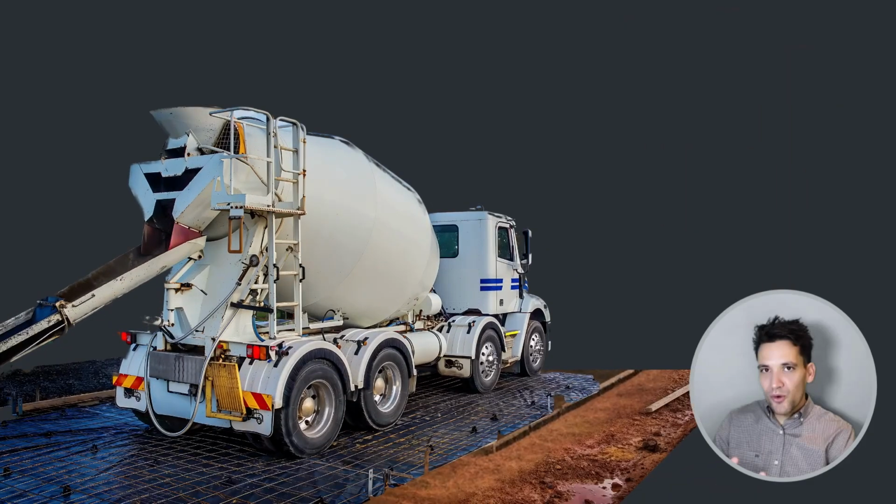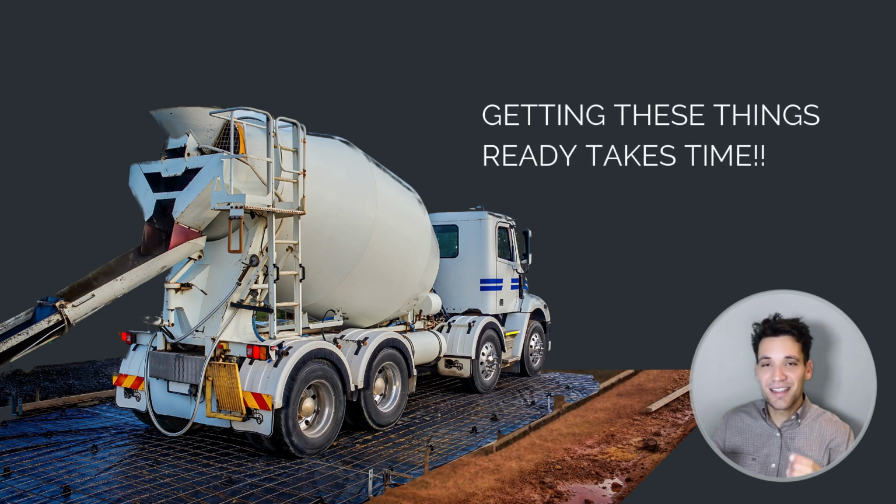Before, I mentioned a 3-week look ahead as an example of a short range program, but I also made the comment that the time slice you choose for your short range programs depends a lot on the task. All these different activities, ordering the materials, getting the subcontractor onboarded, take time. So this leads to the point of how long your short range program or your detailed to-do list should be, and it really depends on how long this stuff takes to get ready.